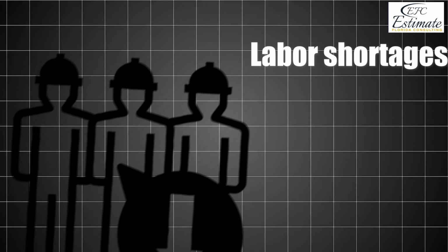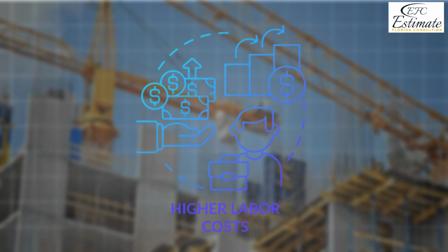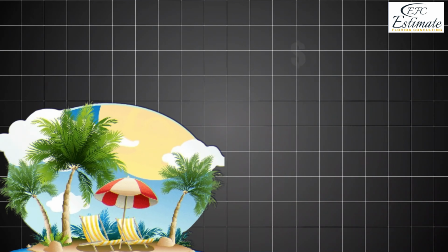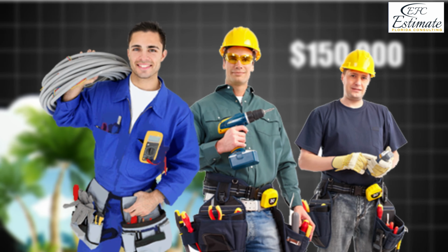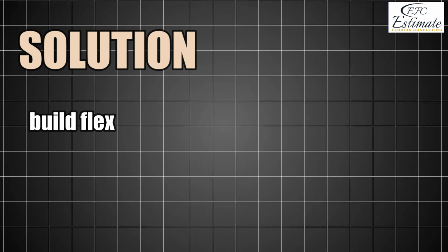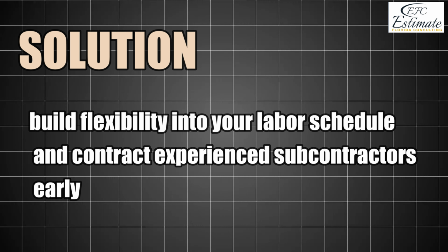Labor shortages. Peak seasons in Florida often lead to higher labor costs and delays. A beach resort project lost $150,000 due to unavailability of skilled electricians. Solution: build flexibility into your labor schedule and contract experienced subcontractors early.